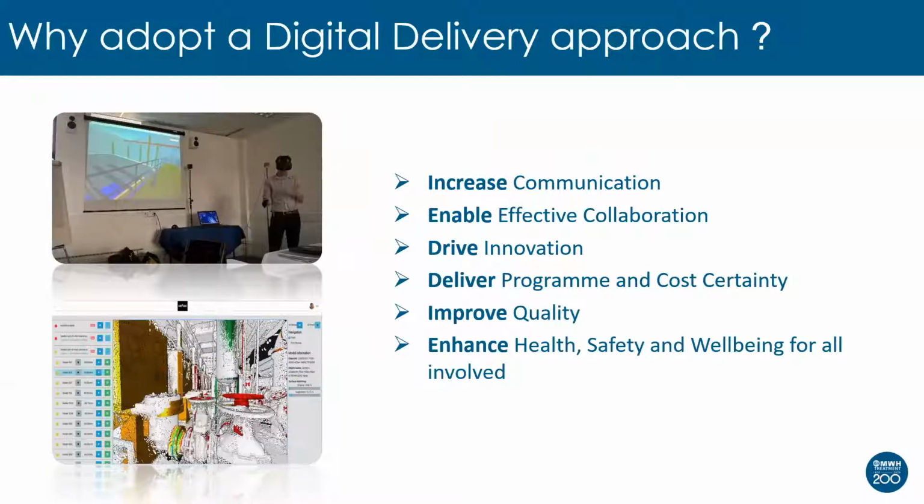Some of the examples I've seen throughout my career is where we've used these tools and we've been able to work out safe sequences of work during the construction phase by minimising risk, by doing things differently, because we can visually see what's happening before it's built, right the way through to the end users, so the operators on the site that have to live with that plant on a day-to-day basis, being able to review and comment and visualise what that plant's going to look like at an early stage, to say, I can't get to that piece of equipment to maintain it. So there's huge benefits with the whole digital approach.